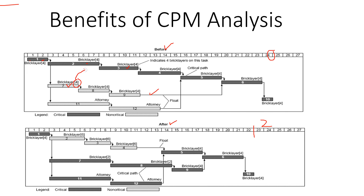In the revised schedule, you can see we have six bricklayers on activity two and two bricklayers remaining on activity seven. Likewise, two resources have been moved from activity eight to activity three — you can see the impact with six bricklayers now deployed on activity three, whereas only two are currently working on activity eight. A similar redeployment occurs with resources moved from activity nine to activity four.